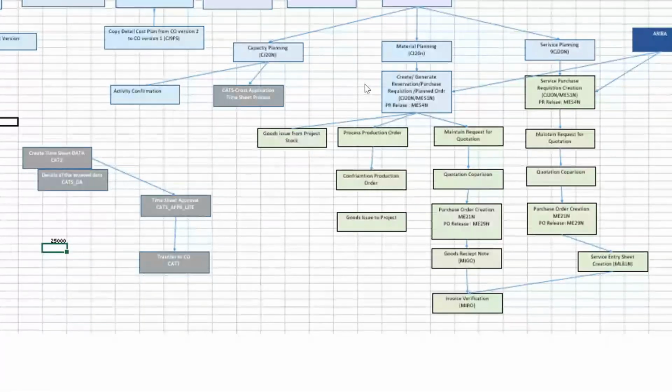And then when you are doing direct posting, for example, if you are purchasing anything with petty cash with reference to your project, or when you are doing any direct posting or JV, joint venture, in that case also a general voucher. Okay, JV, when you are doing that, at that time also actual cost will be posted. Okay, so this actual cost and plan cost, both things are available here in the PS project. You can manage to bring these values back to PPM, that option we are having in the system.